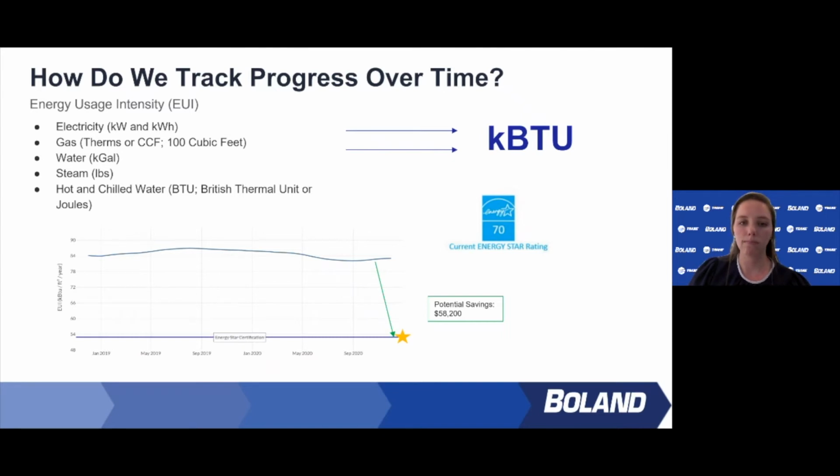And you guys heard me say this last week. So again, when you say, okay, well, I don't know how much money I should put into my building, I don't know what my project size is, I don't know what my budget is. Well, if your procurement people say my ROI threshold is 5 years, okay, take that number, 58,000 times 5. That helps you understand what your project size is. We go into that a little bit more in detail in the previous class, in the sustainability class. So if you want to look for that link.